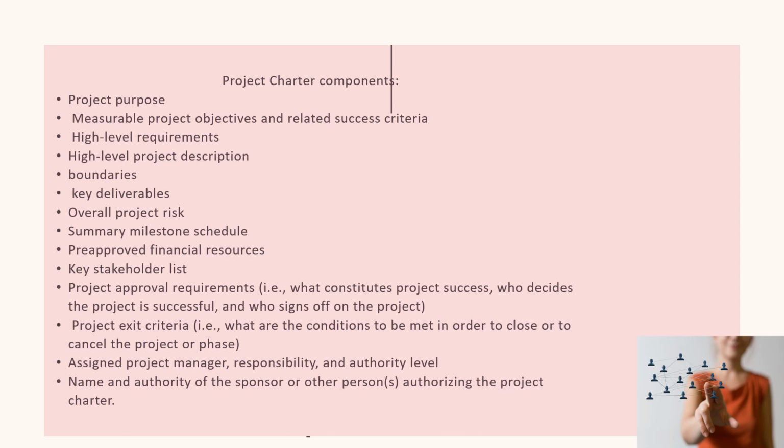Then you also write there your high-level requirements, your project description, the boundaries or the limitations, the key deliverables, the things that you're going to be delivering or providing from this particular project, the overall project risk, the summary milestone schedule, which gives you the highlights of your activities.